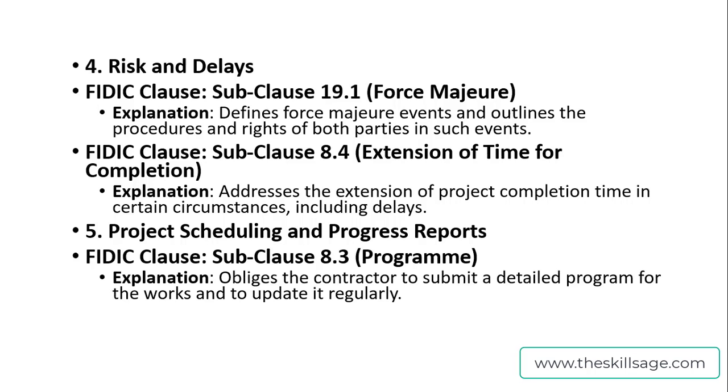Because in the construction industry, FIDIC clause number 8.3 tells us that yes, we need to submit a detailed program. Why? Because a lot of parties are involved, the work is very sensitive, and there are resource suppliers, material suppliers, a designer, a consultant, and the client. So we need to be on the same page. We need to show teamwork to execute the project successfully. So there we need a project schedule to share with each party.